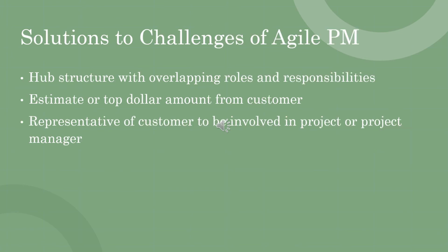A solution for difficulty applying to larger projects could be to create a hub structure with overlapping roles and responsibilities to manage larger projects. Even sometimes the hub structure may not work, you can resort to going back to the traditional project management. Having some main important aspects missing in the beginning of the project due to flexibility does not always sit well with upper management or the customer.